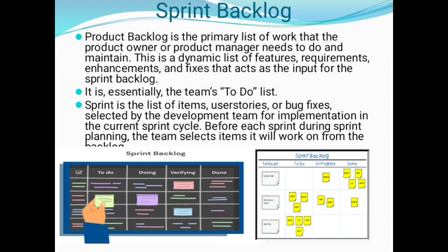Before each sprint, during sprint planning, the team selects the items they will work on from the backlog. The sprint backlog may be flexible and can evolve during the sprint. However, the fundamental sprint goal, what the team wants to achieve from the current sprint, cannot be compromised.